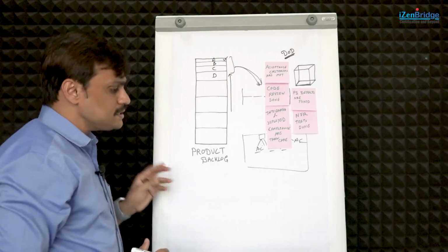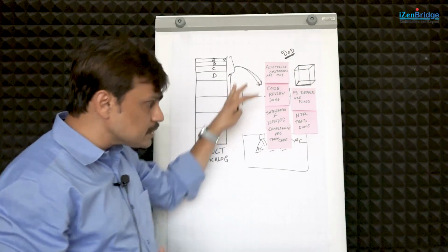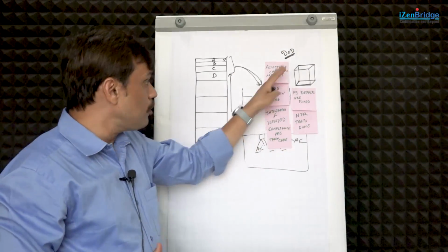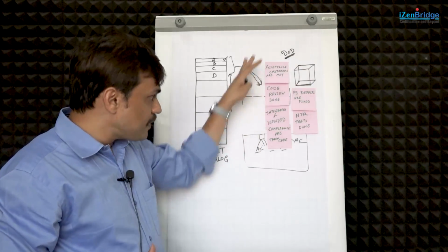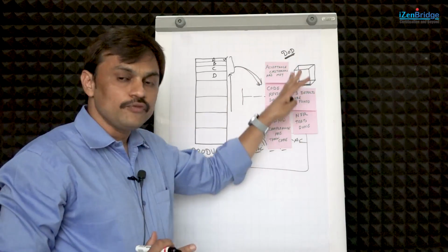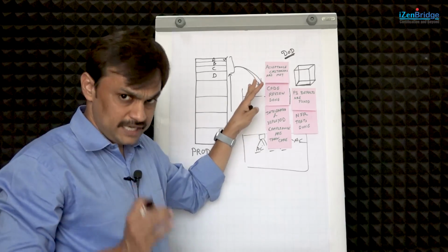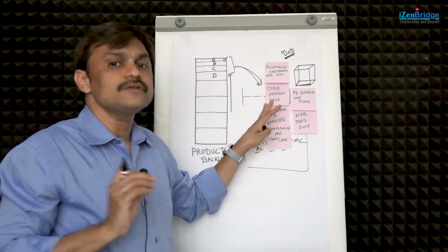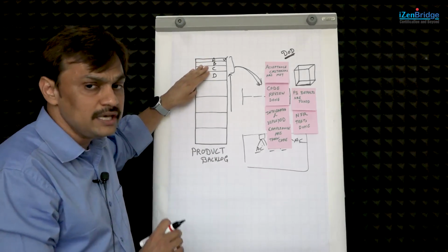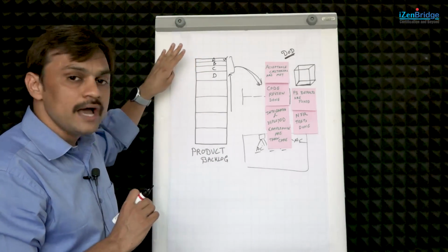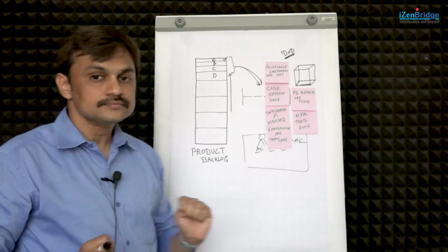So, what we can say is the definition of done is a generic understanding which is common for all the product backlog items which we are picking up, to define what all should be done before we call those items complete. The specific requirement-related understanding of those items is associated with those items only, and it is stored in the form of acceptance criteria.